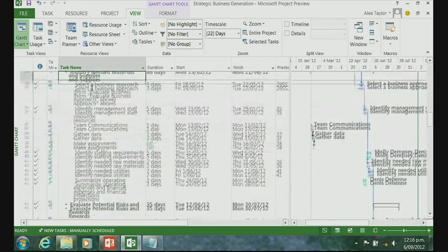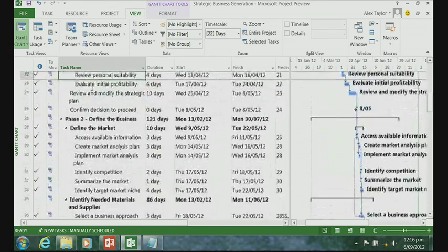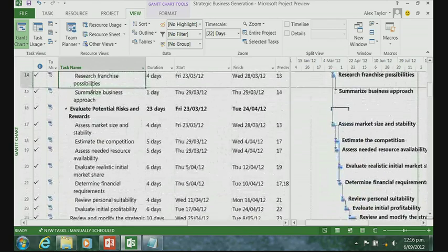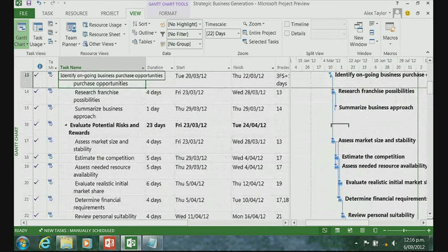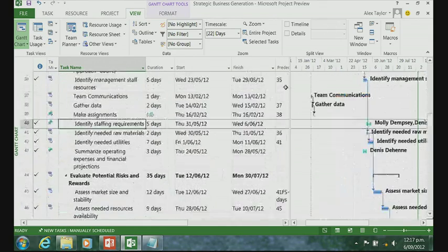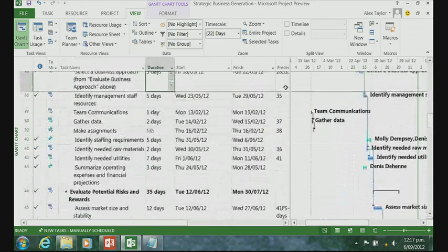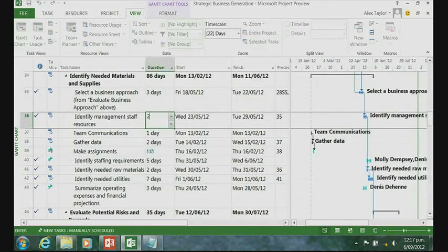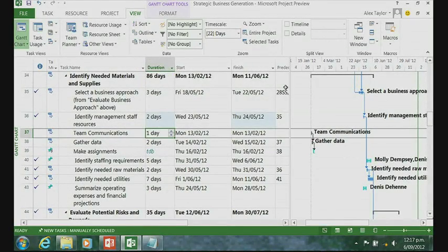It lit up blue, but I'll show you one more. So I'm going to go up and have a look at line 36. This lovely one, I'm going to change its amount down to 2 days. And you'll see that because I changed the duration there, the finish date also changed, and that has updated that to be light blue, so you can see that it actually got altered.